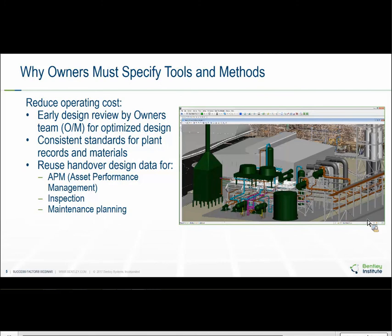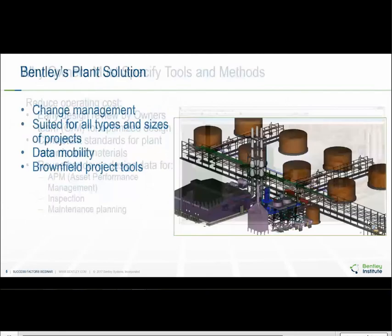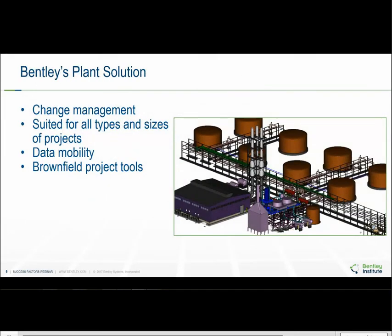In order to control these factors, plant owners are specifying more than just drafting and CAD standards. They're mandating specific formats for deliverables and even the tools used to create and edit them. They're requiring handover of data, documents, models, and reports in the contract, often using these to populate inspection systems, put spares and materials in storehouses, and provide engineering records to operations and maintenance as a training tool. If an owner is going to specify the format of a project deliverable and the technology used to produce it, Bentley developed the plant solution with the total lifecycle in mind.